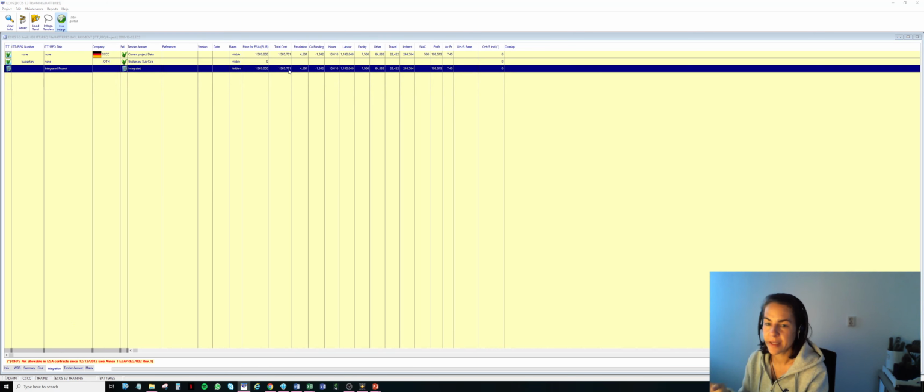So what we can see here is that we have indeed a file for the company C related to the own share, and that there is no budgetary subcos. And indeed, if you remember, in our industrial scenario, under the company B, we have no subcontractors, no lower level. Therefore, you do not need to integrate, right?